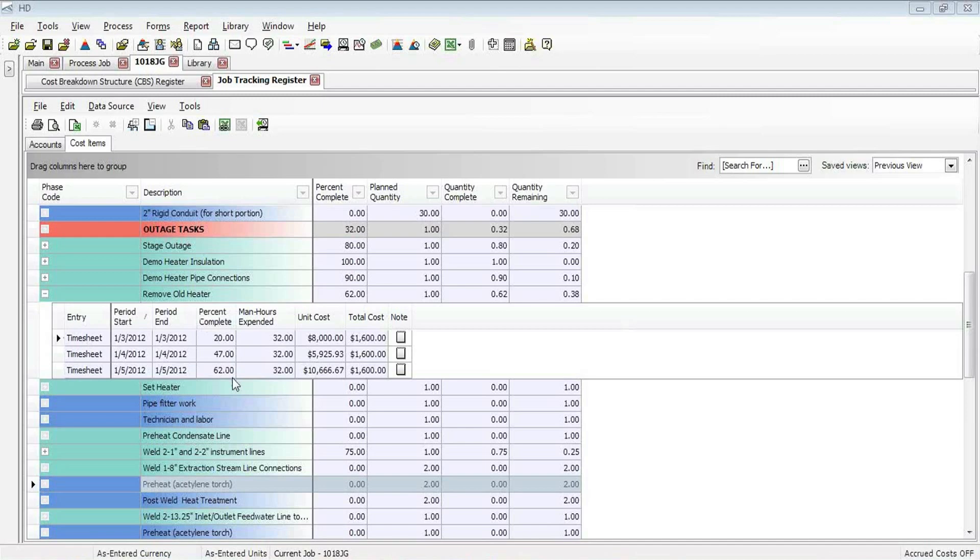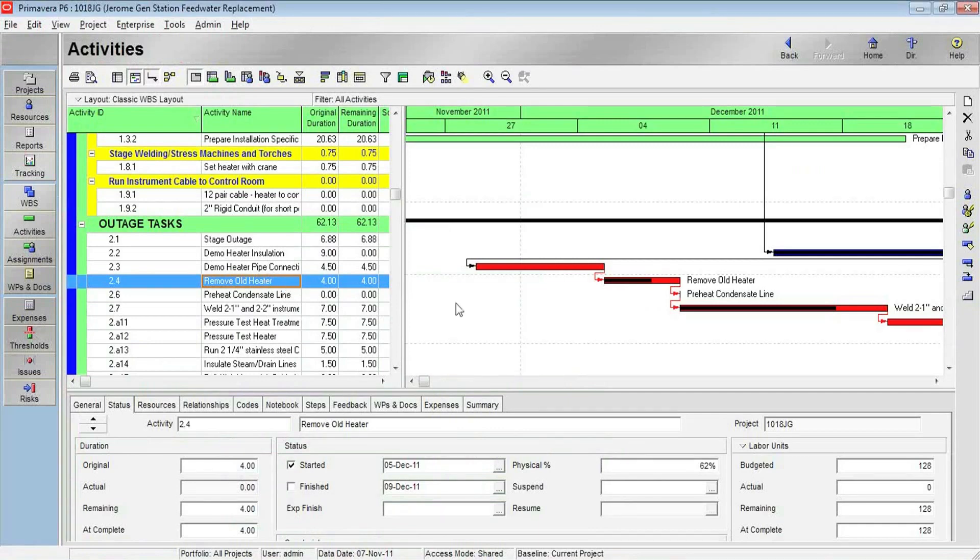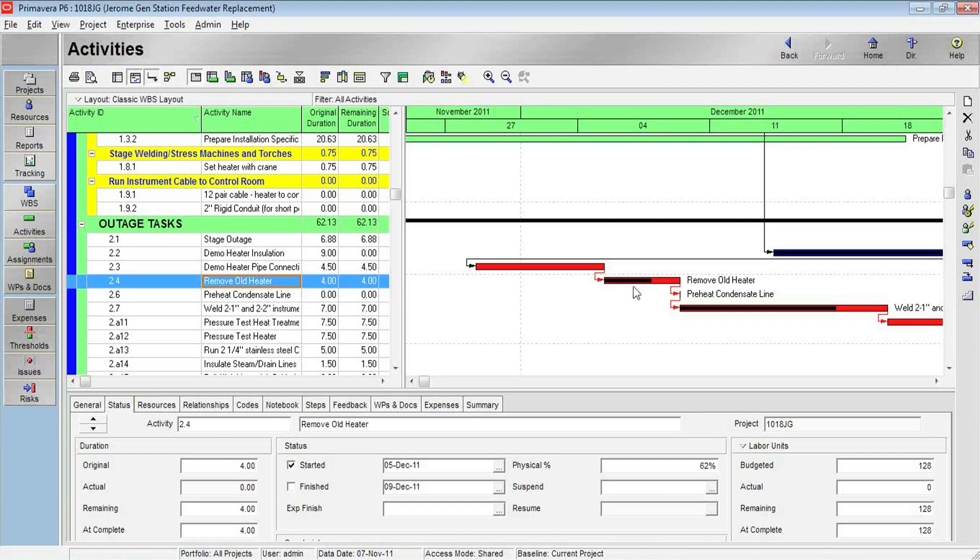Now, I have kept a synchronization with Primavera so that that physical percent complete can show up in Oracle Primavera as well. If I jump over to there, you can see the remove old heater. That task and the other tasks along with it are all loaded into Primavera, and I can see the physical percent complete. There is my 62% complete represented as the physical percent complete, the black bar, and it's also noted down below under my status.